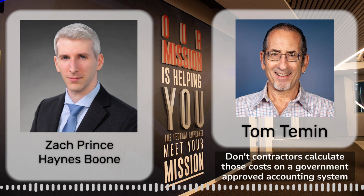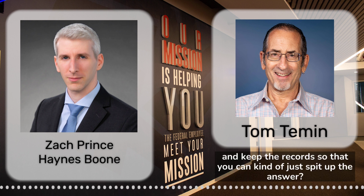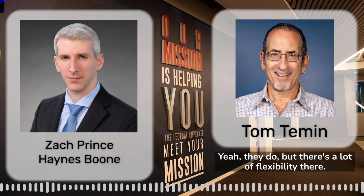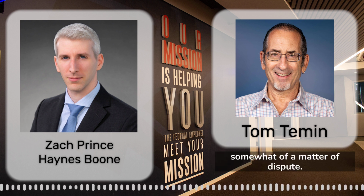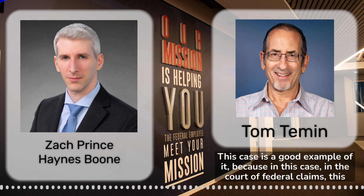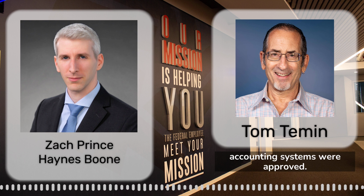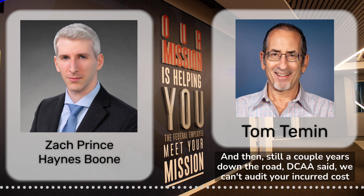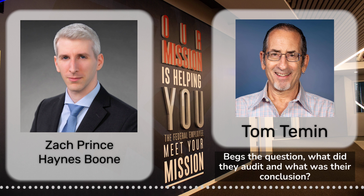Don't contractors calculate those costs on a government-approved accounting system and keep the records so that you can kind of just spit out the answer? Yeah, they do, but there's a lot of flexibility there. And, you know, the nature of what it means to have an approved accounting system is somewhat of a matter of dispute. This case is a good example of it because in this case from the Court of Federal Claims, this company, Reliability and Performance Technologies, had 2 DCAA audits saying their accounting systems were approved. And then still a couple years down the road, DCAA said, we can't audit your incurred cost proposals because your accounting system wasn't sufficient. Begs the question, what did they audit and what was their conclusion?